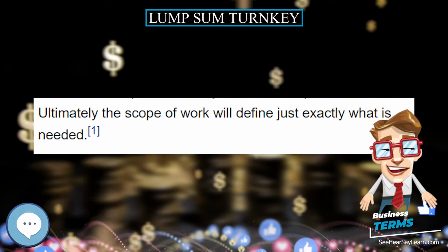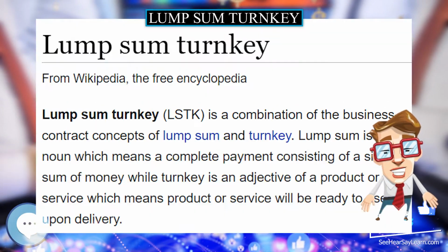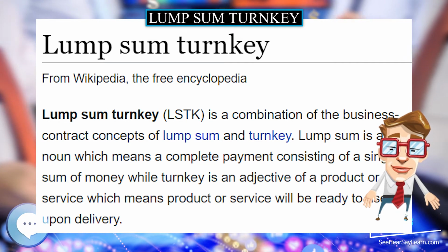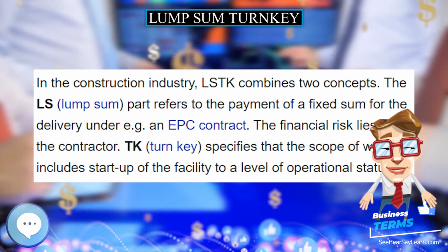TK, turnkey, specifies that the scope of work includes startup of the facility to a level of operational status. Ultimately, the scope of work will define just exactly what is needed.